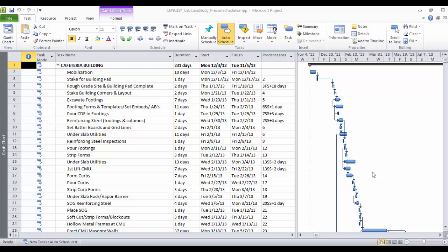So you communicate with the owner rep, and send a schedule and say, this is my latest schedule up to this status date. And the expectation here is that they see the progress in terms of how much you finished, what the tasks or activities in progress are, and also what delays there are, hopefully not, but if there are any delays, what is the impact on the project finish time. So again, the assumption is we will have a schedule set for you as a project engineer to update and keep updating.